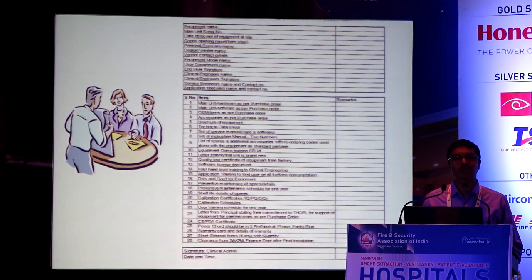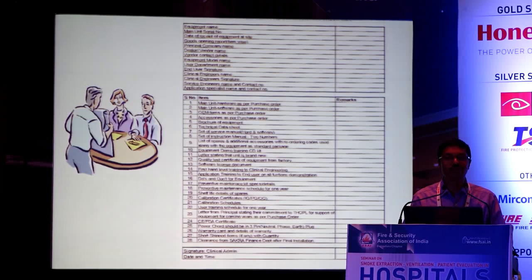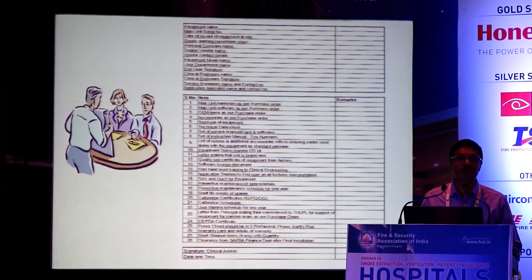There are instances in third world countries where the same model of equipment sold abroad is sold at a lower cost, but it may be refurbished, or some compromise has happened. So it is very, very important from a hospital perspective that an equipment pre-commissioning checklist is there, and that this is done as part of your sales agreement, so that you will be sure that the equipment which has been commissioned is safe to be used.